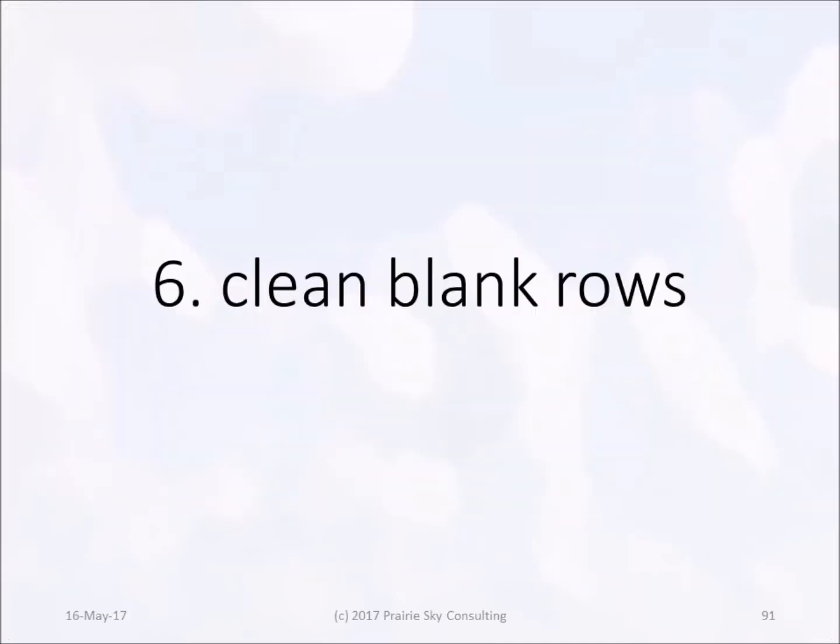While we've completed adding each of the files, there's almost always a difference between what's on the submittal register and what's delivered on the project. So let's take a look at that. Sometimes there's a change because one file could pertain to multiple submittals. Other times it's because of the types of information that are available. It's often the case that the complete list of submittals covers later phases of a project.